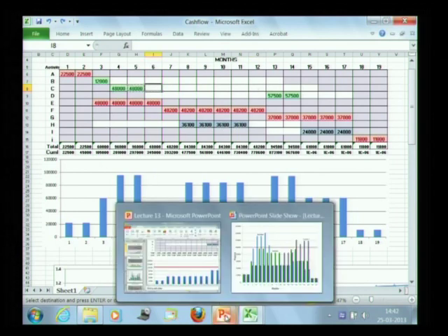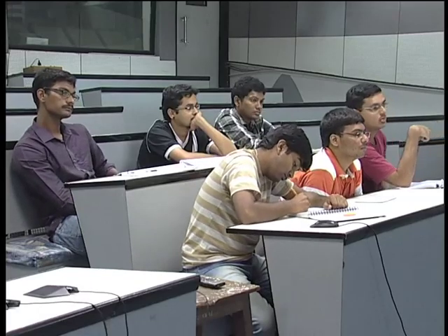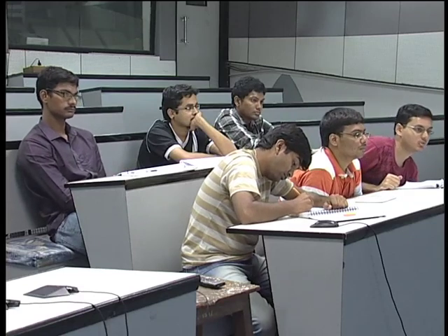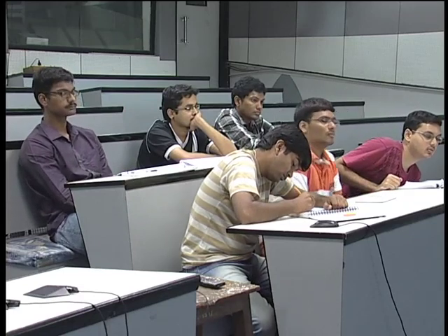So is there a way to rate the solution, the feasible solution that you got? Right, so now you need rules so that you can get to the better solution. Depending on project situations, yes, there are ways to rate solutions, and ultimately you want to use the minimum amount of one rule. One rule you can say is I want to use the minimum amount of float. I want my solution to be such that I do not go to the late extreme, but I use the minimum amount of float of all my non-critical activities. That would be a simple way to rate.